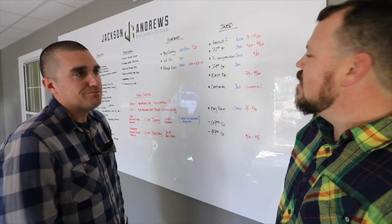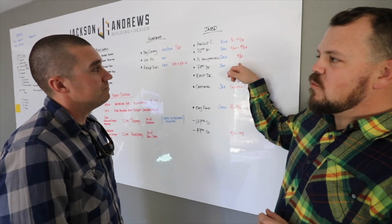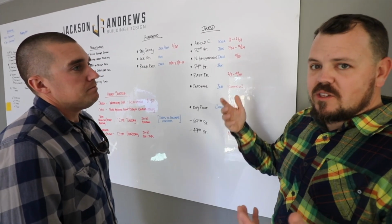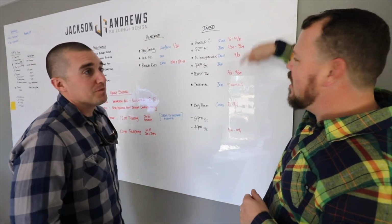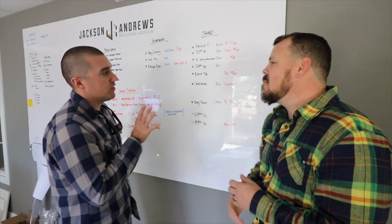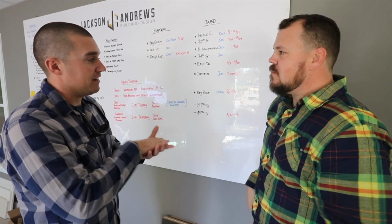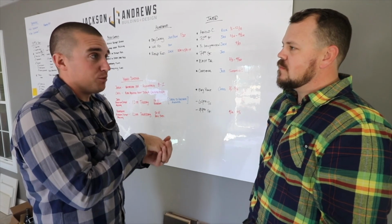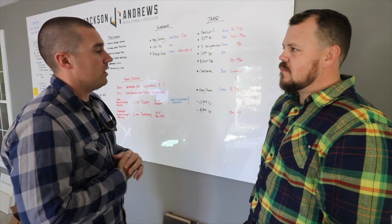So the idea here being, you're making weekly, or sometimes more than once a week, assessments as to what's going on with the schedule, and you can quickly erase it and reassess, and that may affect things that are further down too. 100%. We're always trying to communicate effectively and clearly with our clients, and especially if someone's signing a contract, a lot of those clients want to know how long you're going to be on my house, how long you're going to be on our property, when are you going to start, when are you going to be done, how can our family organize around that.